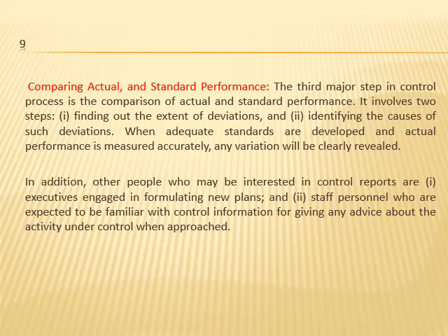Measurement of performance, analysis of deviation and their causes may be of no use unless these are communicated to the person who can take corrective action. Such communication is presented generally in the form of a report showing performance standard, actual performance, deviation between those two, tolerance limits and causes for deviation.